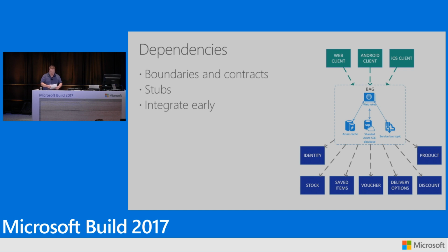Mostly what I've just covered could be described as shortening the lines of communication. So one of the key things I learned from this was you had to jump on any communication problems as quickly as possible. Simple things like 2 teams misunderstanding a contract definition. Most development teams would spend weeks arguing about it, but that would have doomed us to failure. So one of my key responsibilities is to make sure I have these contract conversations with the teams to help them move forward where they have disagreements with each other.